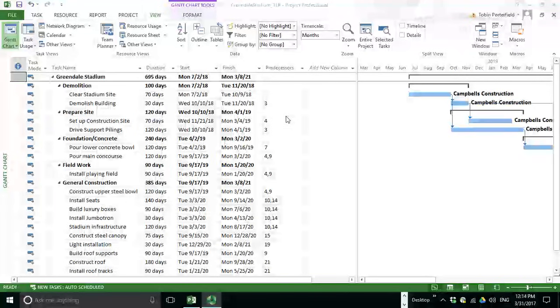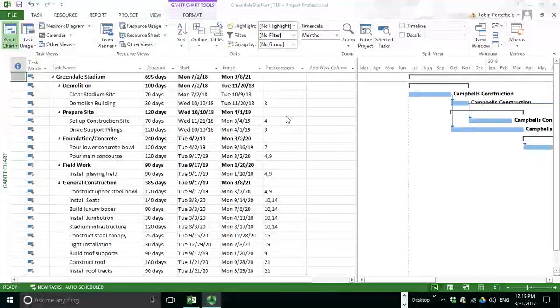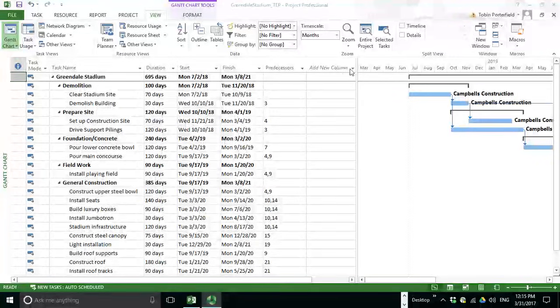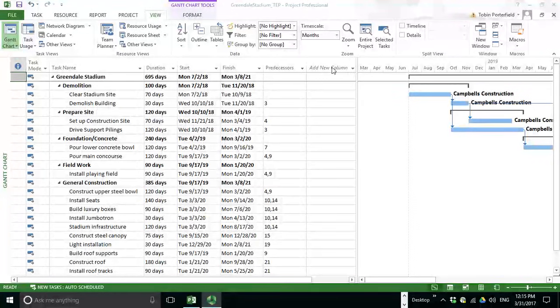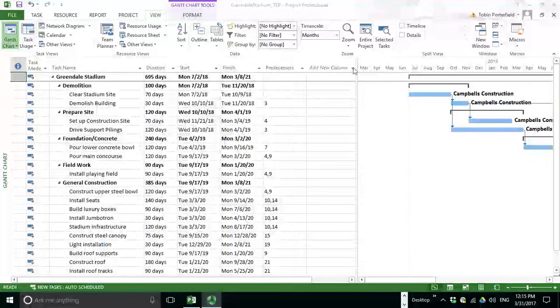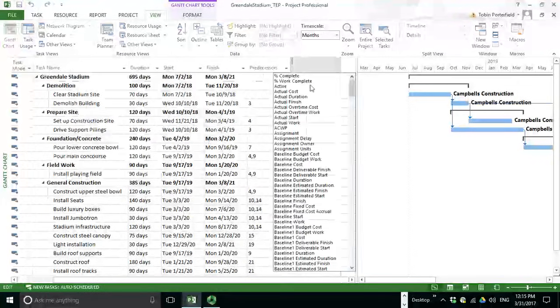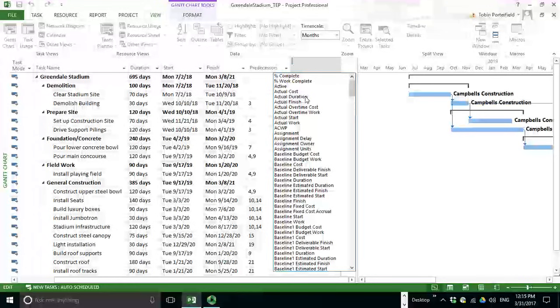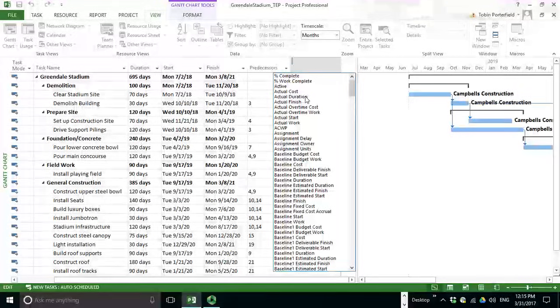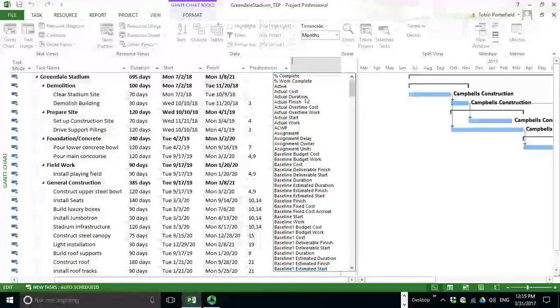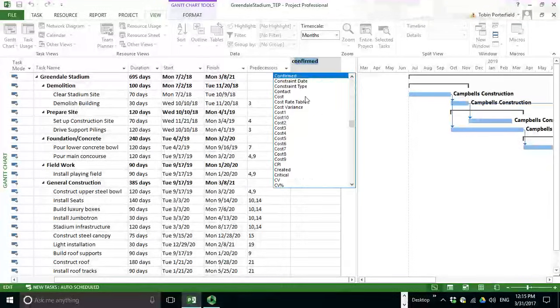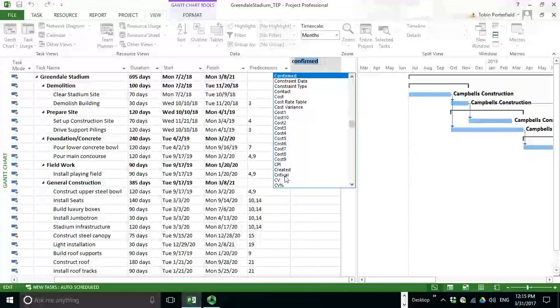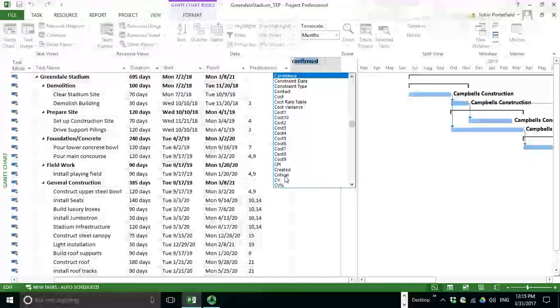Those are all in place. There are a couple ways that we can identify the critical path. One is to go up here to the area that says add new column. If you flip down on that, there are many data elements that you can add to your Gantt chart. I'm going to type a C because I know that I want to go to critical path and get to these faster. So there's critical.